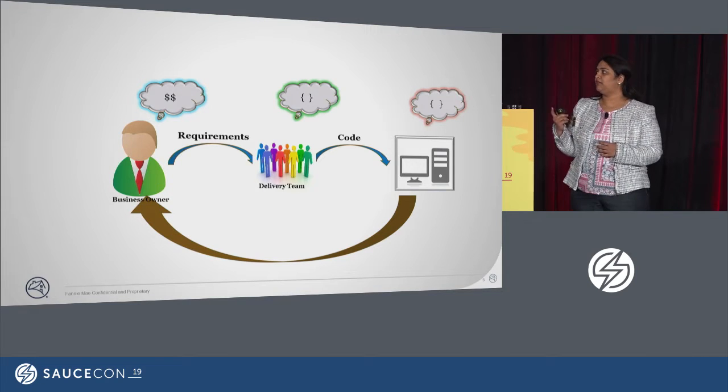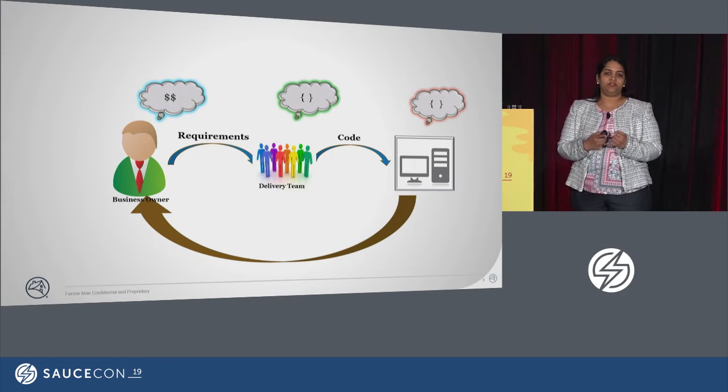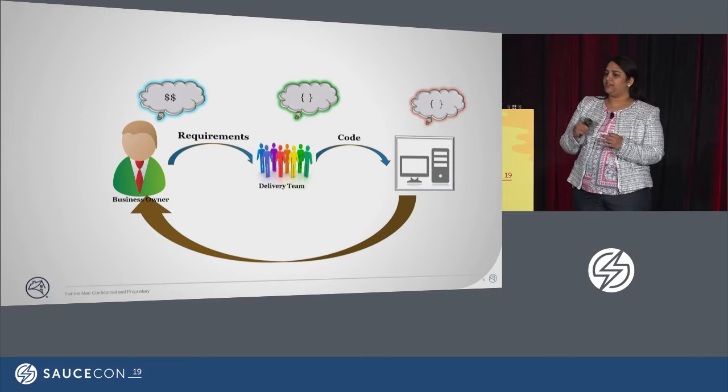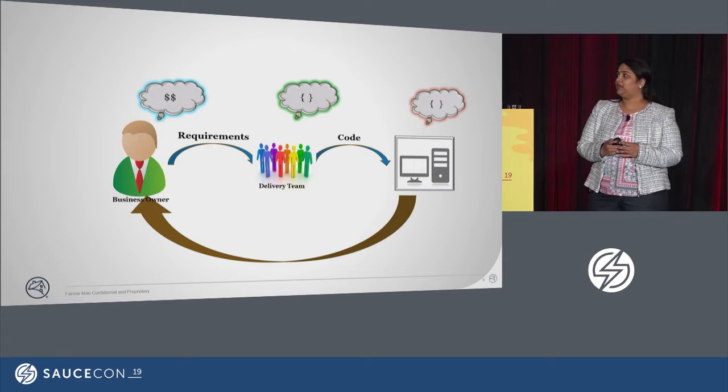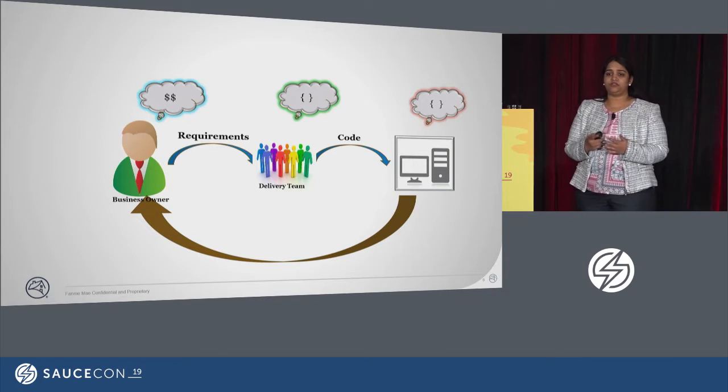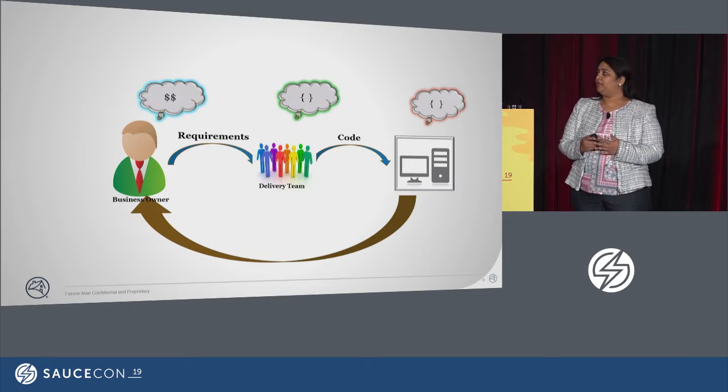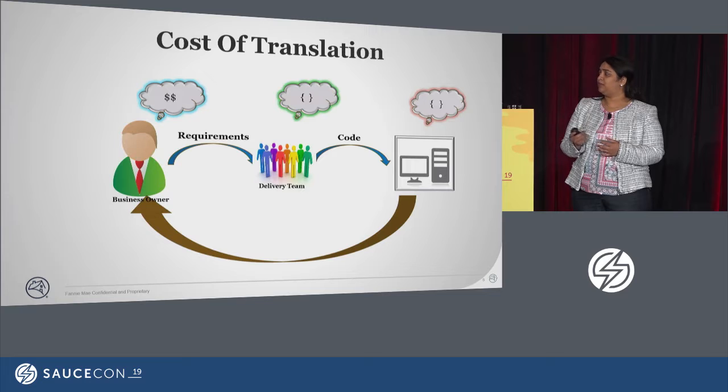The delivery team might understand that he wants a registration system, but they might imply a different meaning to that. It might be a user registration system, or it might be a system registration system, or it might be something else. And if you see the traditional project lifecycle, where it takes almost months to years to deliver the software, it takes years to spot the problem.